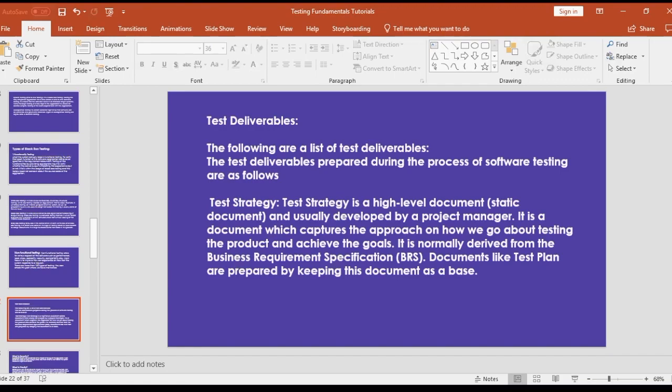Anything within the roof goes to this developer. So you would have documented all that so that when you raise your defect within your defect management tool, you know who to assign it to, because you've planned for all that. You've documented all that in the test plan. And that's why we plan before we start testing. It's a process. It's not just turn up, look at the system, and test.